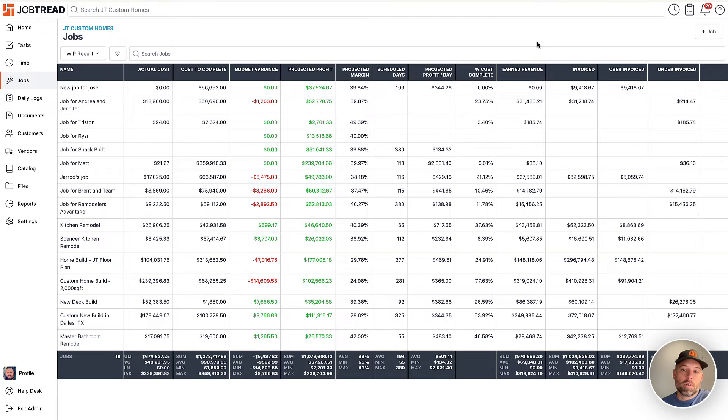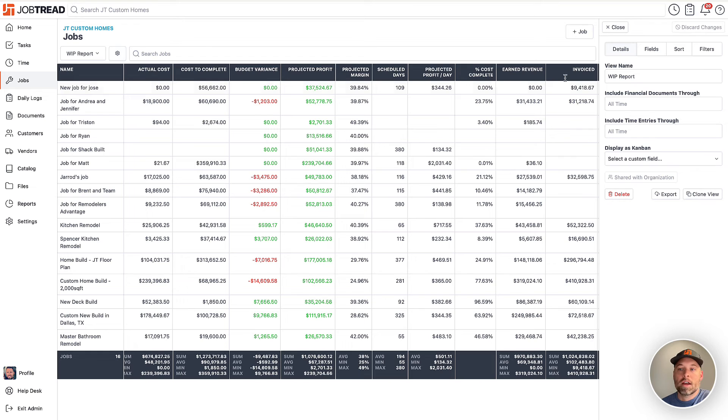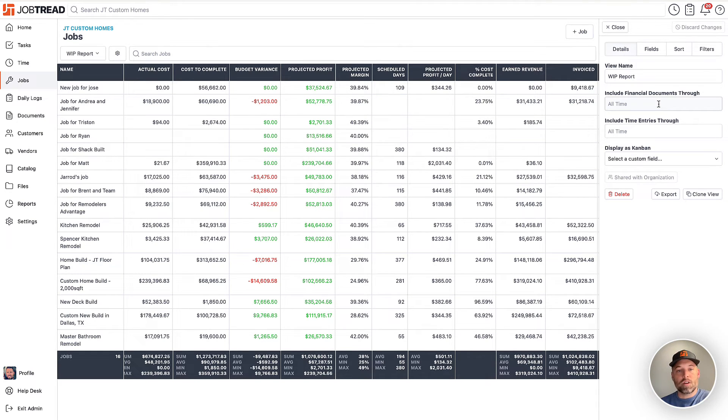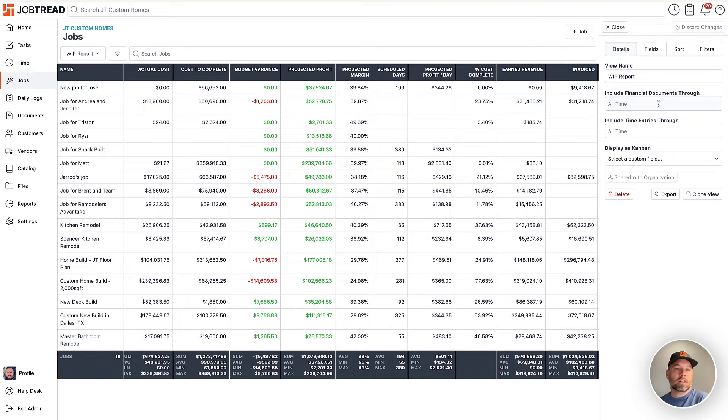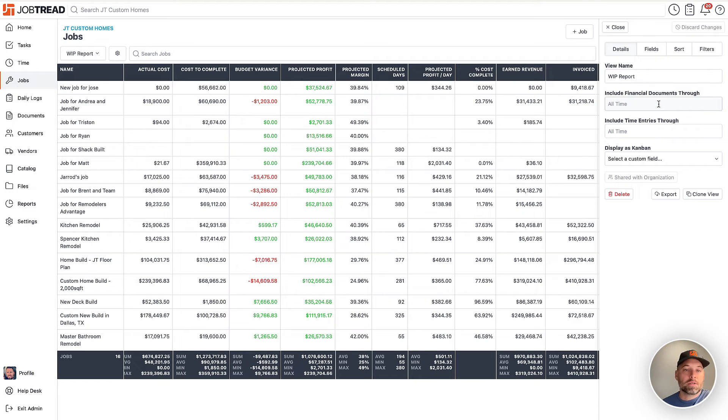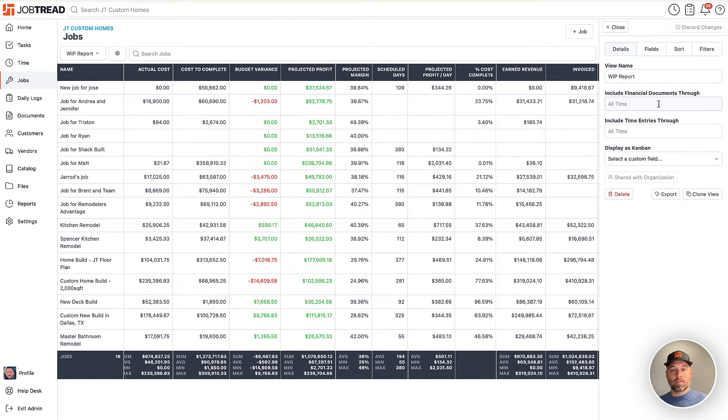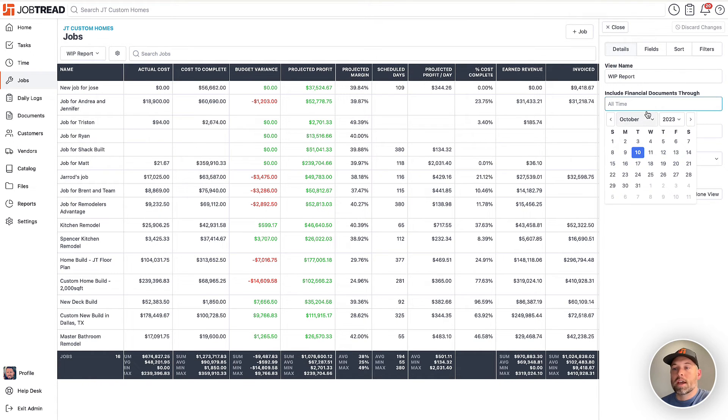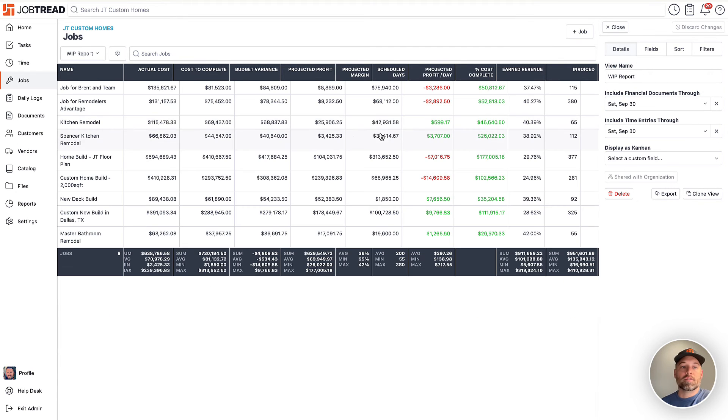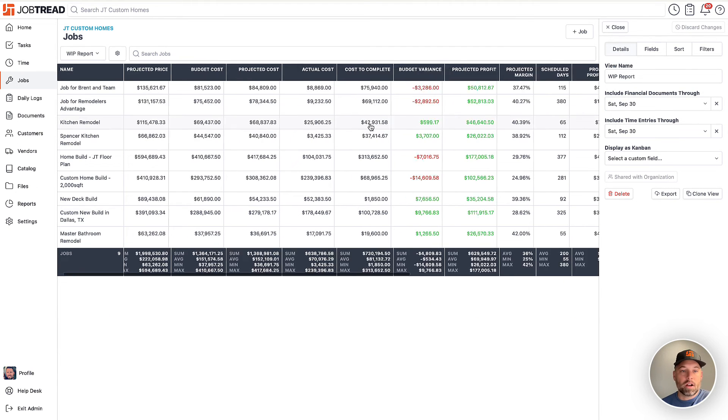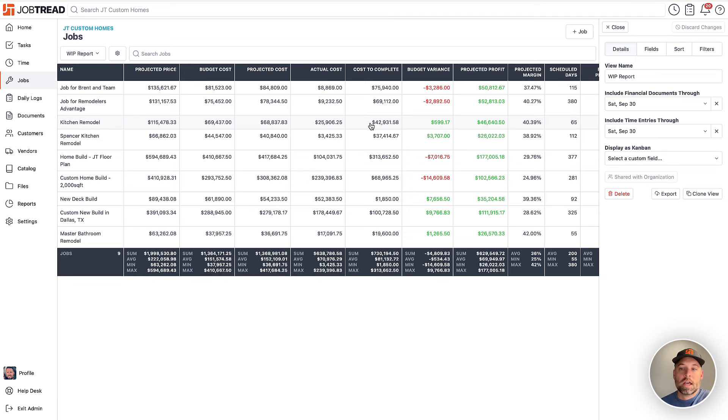An important part of this as well is under the gear icon right here, the ability to scope this report based off time. So I only want to see financial documents that were submitted before the end of last month, because if I'm coming back, let's say six to seven days after the end of the month, it's possible that these numbers don't really make sense anymore because we've had a week of new documents, new financial documents that have come through. So here you could say, I only want to see the financials as of the last day of September. So select the day here. This will update on my cost projections and I'll have those numbers as of September 30th.